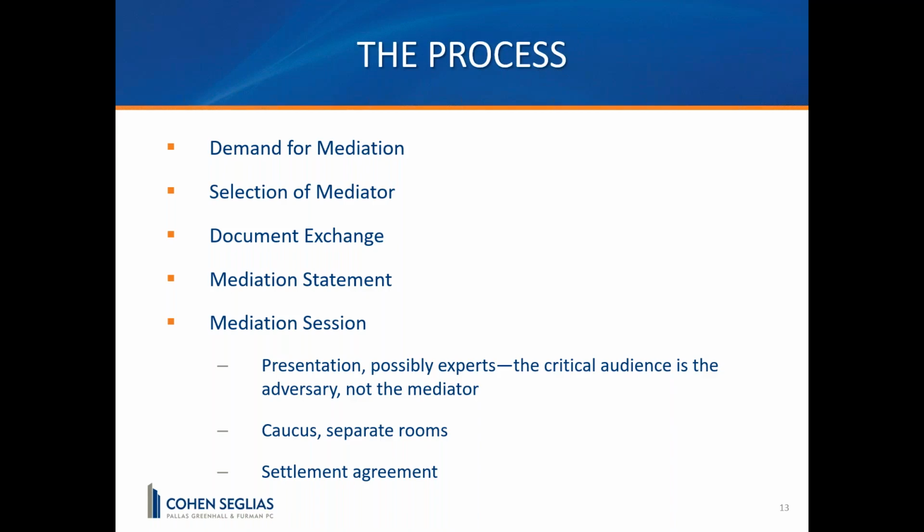It all depends on the complexity of the dispute. Obviously, if it's a simple case involving non-payment, you probably don't need to exchange a bunch of documents because the dispute is pretty narrow. But if it's a claim for delays and inefficiencies or scope issues, it might make some sense to exchange some documents in the mediation process to better understand the other party's position.